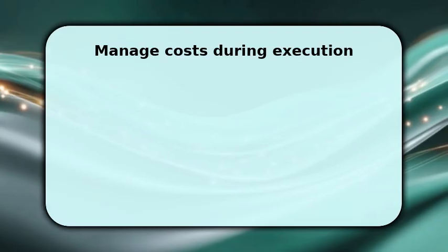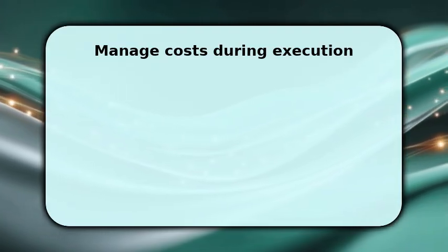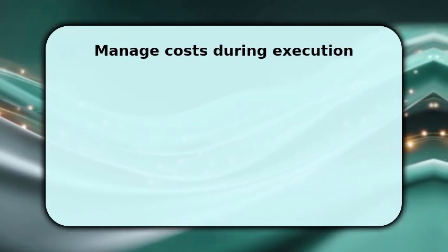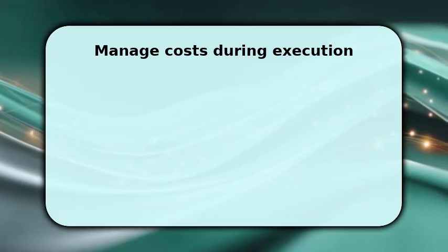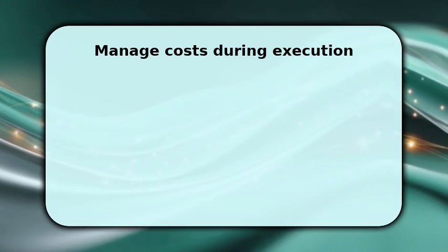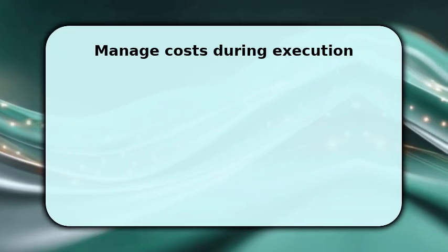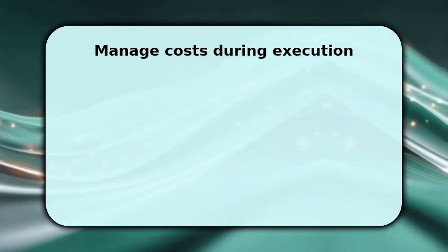You monitor spending by comparing actuals to baseline at least weekly. Spotlight any variances over 3% or $1,000 immediately. Once variances appear, trigger change control, document scope changes, quantify cost and schedule impact, and decide to approve, reject, or defer. Make sure to rebaseline formally when approved so reporting stays meaningful.